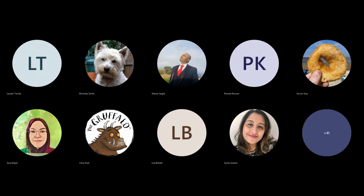If it's more of a buy versus build, you might need different types of skills within the team. You're probably going to be assessing the market and what products are out there that we can buy in, so you're not necessarily going to be spending loads of time designing. So there are some rules of thumb. But throughout your alpha phase, that's when you're really looking at, okay, if we are going to build something or buy something, what's the team that we need? That's when you really get into the details around cost, and then you'd be trying to submit another business case for approval at that point. So, yeah, that's how it's worked in other departments for me.